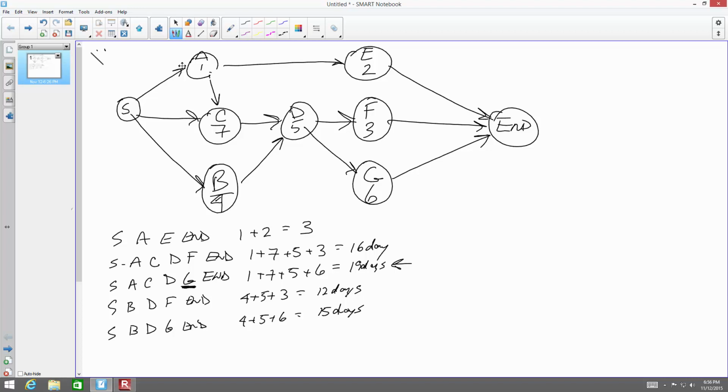Cost plus fixed fee means if I spend $100 on something, I'm going to get reimbursed for that cost, plus I'm going to get a fee on top of that. I'm going to charge them 10%, 15%, 20%, whatever it might be. If we have a lump sum fee, I'm going to give you $100 to do the work. If you can get it done in 10 minutes, great. If it takes you 3 days, tough luck. Single lump sum. You've got salary plus. It's a new term for me. I'm not sure if that term even really exists or if it's legal.